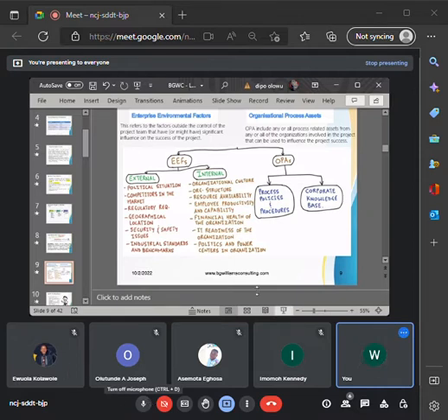Let's look at it. Under the external factors, you are looking at political situations, and there's nothing you can do about it. Like now, currently in the eastern states, there is a sit-at-home order. If you are embarking on a project in an eastern location, you must consider the enterprise environmental factor of sit-at-home. Do you get it? There's nothing you can do about it. You cannot say, why would they say we should sit at home on Monday? Don't they know that Monday is a very critical working day? No, I have to go and see the IPOB leader and discuss matters with him because this project is very important to this organization.